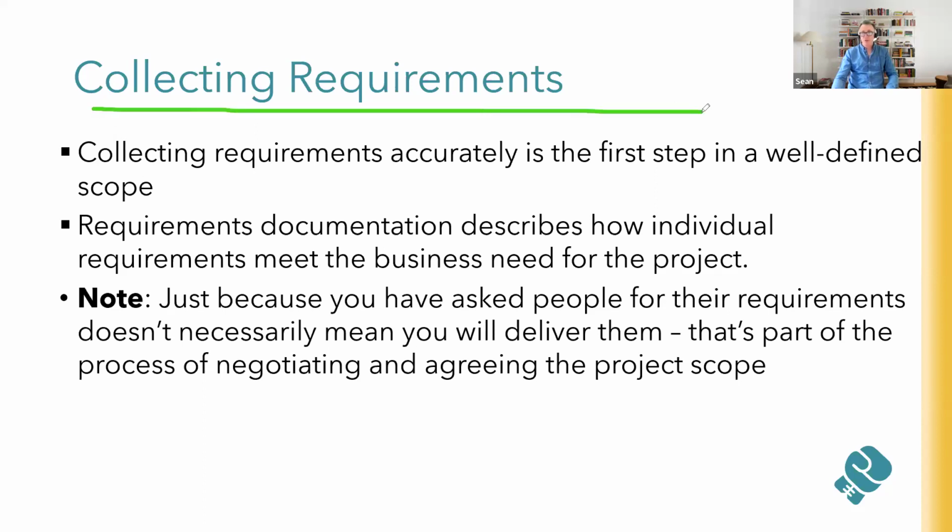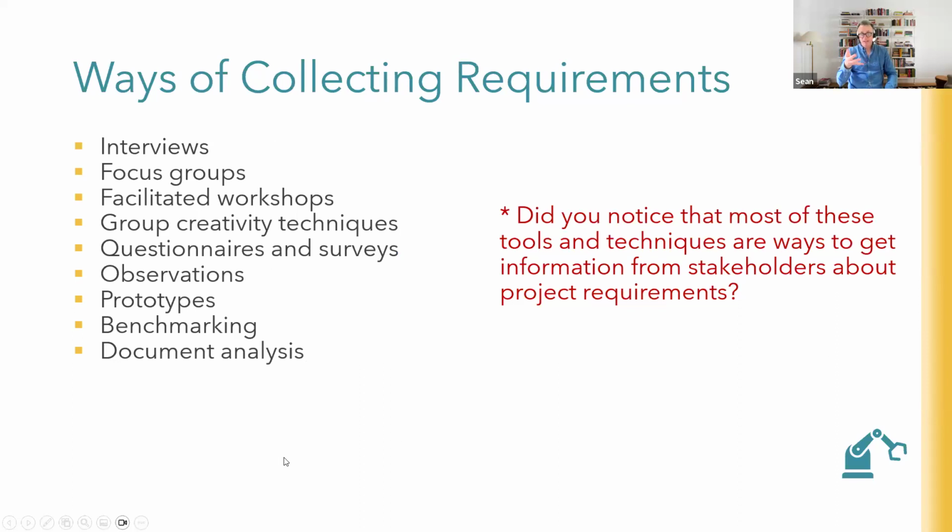And in terms of who should do this, well, the project manager should be the one who commissions it. But I like business analysts to do this sort of work, whether it's an IT project or a construction project, to get out there and define the requirements and map them and give good traceability matrices. They're going to use these sorts of ways of collecting requirements. They're going to be having interviews, focus groups, workshops, group creativity techniques like brainstorming or thinking outside the box. They'll be sending out questionnaires and surveys to collect information.